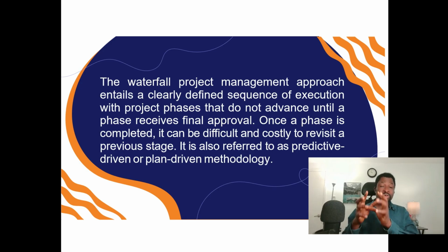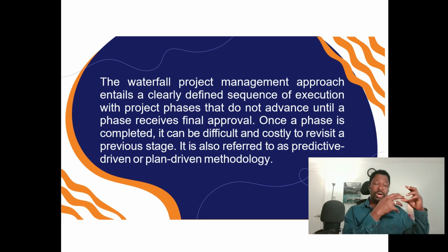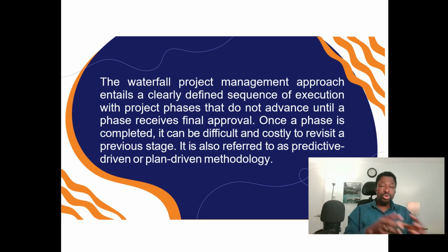So the WBS gives us some knowledge of what we have to do, and now we have to work with the team and get each phase that we have to complete on each of the features. So we now take all these things into our project schedule. All these things we do during the planning phase.